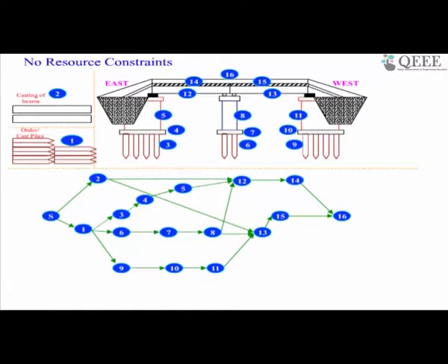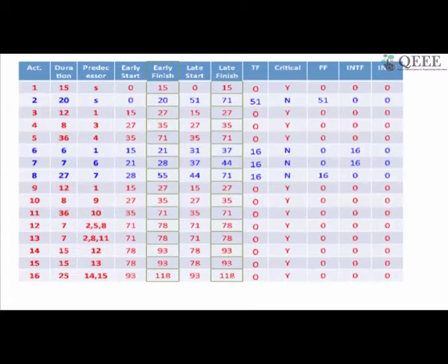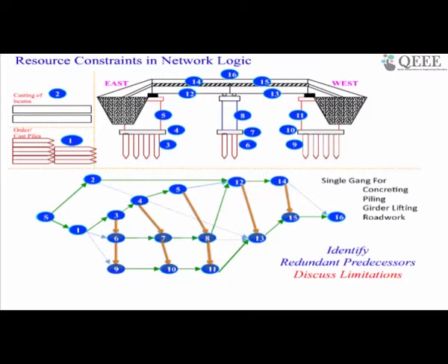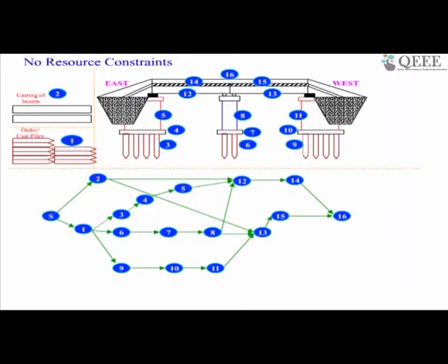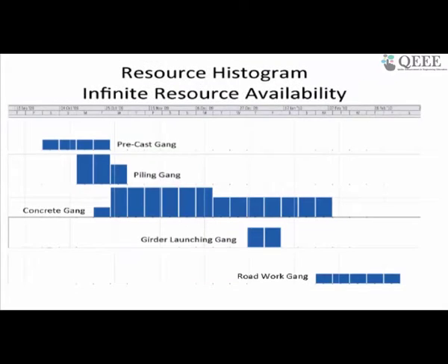So we have effort driven, or duration driven. If you go into the tools, you will find this, and if we are going to make it effort driven, we have to do this appropriately based on the resources that are there. For simple projects, or projects where you're not loading your resources onto the tool at all, this approach might be okay. But in most sophisticated approaches where resources are put into the tools, it is better to leave it open-ended and let the tool take care of the resource management, but you actually have to know what the tool is doing.